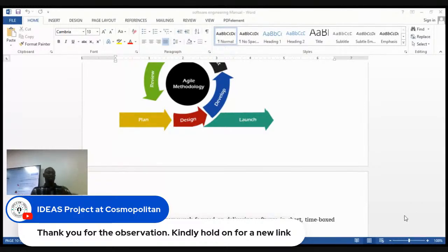We look at it, do a design, analyze it, and say, okay, this is how much it will cost you. This is our account number. And this is the design for it. Indicate that this is what you want by attaching your signature. They will attach. If they think that the software has some kind of intellectual property, they will send us a document called non-disclosure agreement through the email. We read it through. Then the last part, which is the signature part, we sign it, scan it, and send it back to them to show that we have agreed.